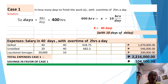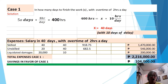Case 1: In how many days will they finish the work with overtime of 2 hours a day? It is best to start the solution by computing the total hours needed to finish the work using the given 50 days: 50 days times 8 hours per day equals 400 hours. Then, using ratio and proportion, 400 hours divided by 10 hours per day gives us 40 days.